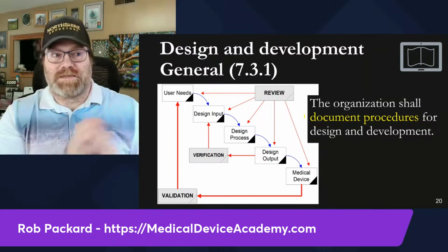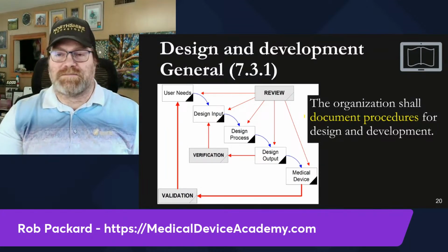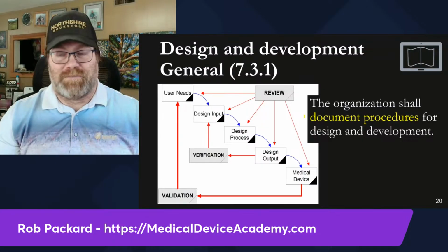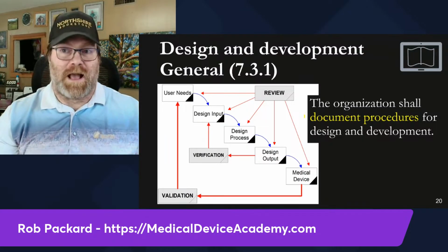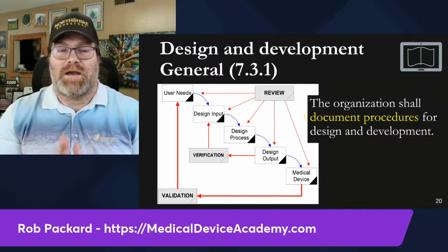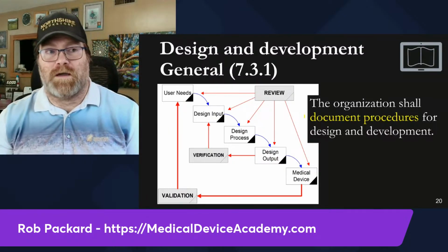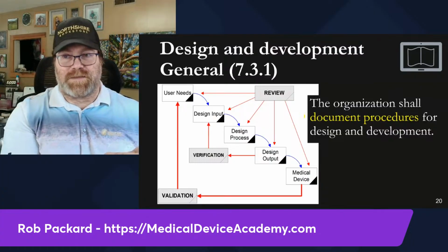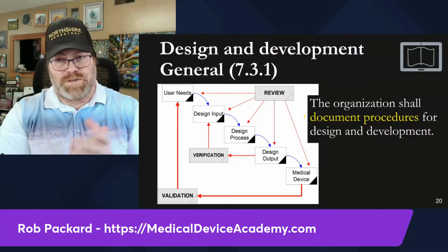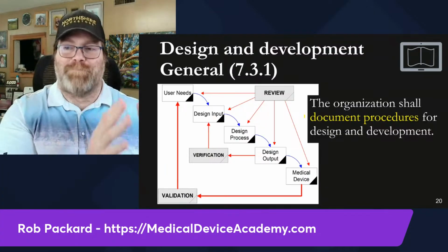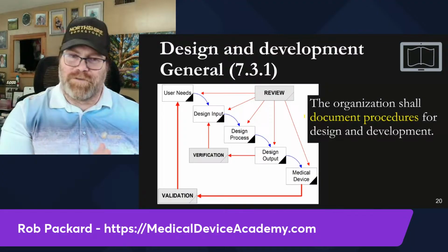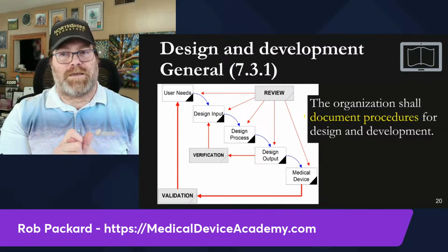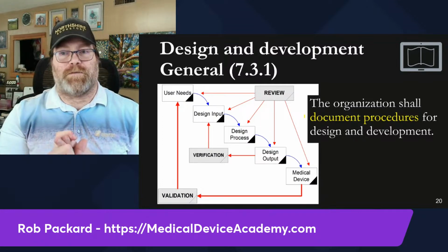So this is the standard. This is the diagram the FDA uses with permission from Health Canada, because they didn't even create it. And Health Canada copied it from 1994's version of ISO 9001. You're required to have a procedure, but you are not required to copy this diagram, and I applaud you if you don't. Come up with your own hybrid model that uses an iterative approach and has two key gates, one before you start spending all that money on testing and one when you send it off to be reviewed.